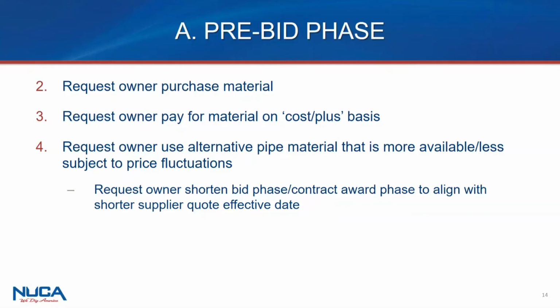To recommend the owner use a pipe that's more readily available, as well as potentially at a price that's more stable. And again, I think what's important to understand about that is I've got both the DOT in South Dakota recommending that, as well as the DOT in Texas. The South Dakota DOT was saying, when material availability will delay work and completion of the project, the department will consider proposals from contractors to substitute materials.